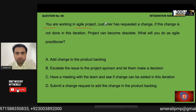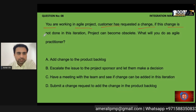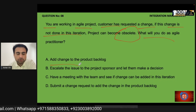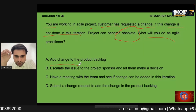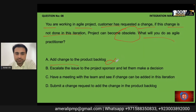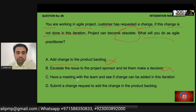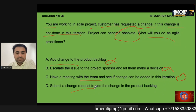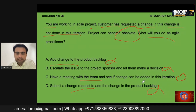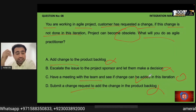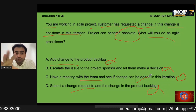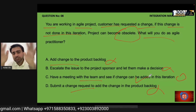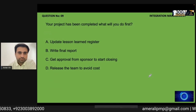Question: You are working in an agile project. A customer has requested a change — if the change is not done in this iteration, the project can become obsolete. What will you do as an agile practitioner? Adding to the product backlog for a future sprint is not the answer since obsolescence is at risk. Escalation is not the agile way. Submitting a formal change request is never done in agile. The correct answer is to have a meeting with the team and discuss if the change can be added to the current iteration.